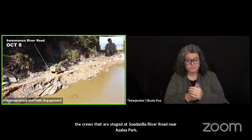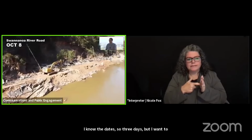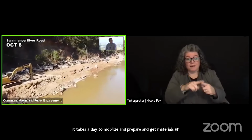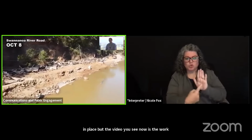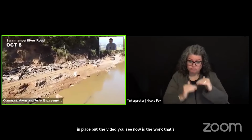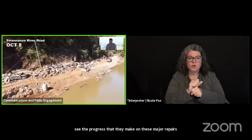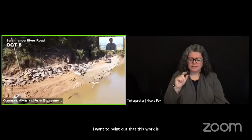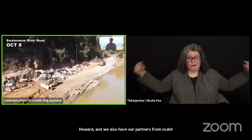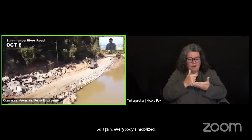I know the dates show 3 days, but I want to point out it takes a day to mobilize and prepare and get materials in place. But the video you see now is the work that's been done really in 2 days' time. So again, you can see the progress that they make on these major repairs. I want to point out that this work is Tanoka and TP Howard, and we also have our partners from NCDOT. They are coming from the opposite direction to meet us. So again, everybody's mobilized. We're focused on the major transmission lines first.